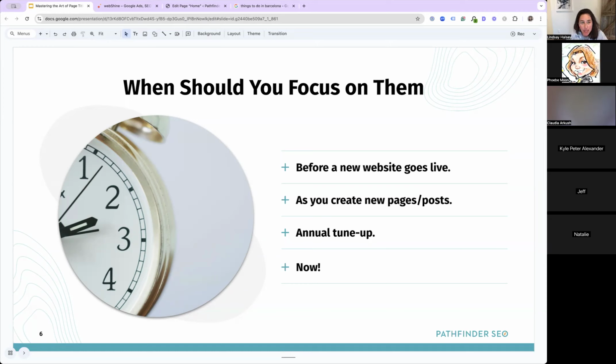It may be something that you have wrapped into your web design, website redesign or new website projects, where you have a line item in the project scope or a handful of line items for the things you do for SEO. So 301 redirects, keyword research, page titles and meta descriptions, and it's baked into those website redesign projects that you're going to manage these fields. And so you know that it's in the project scope and you've accounted for the time and effort you're going to put into it. That can be a really good way to handle things.